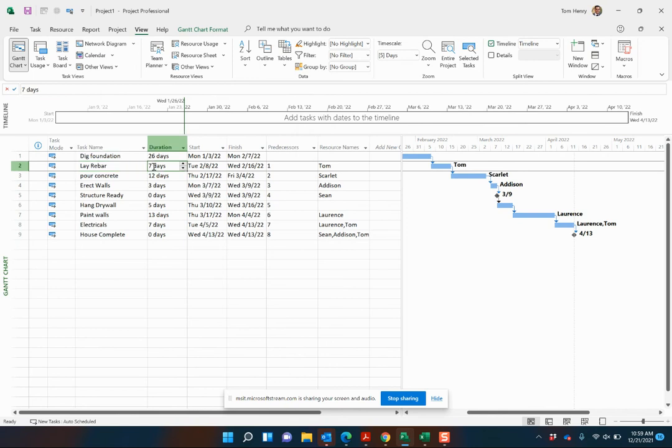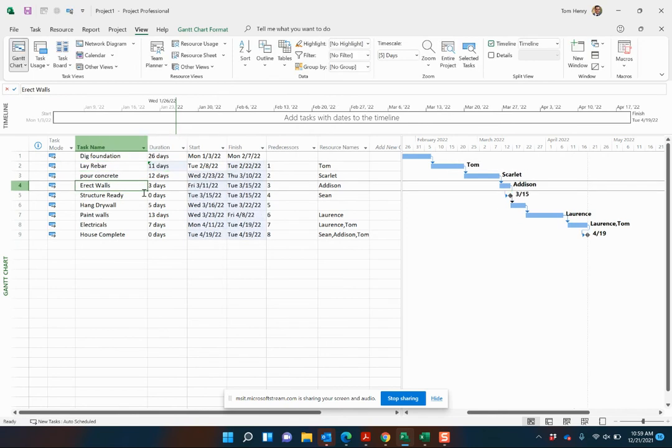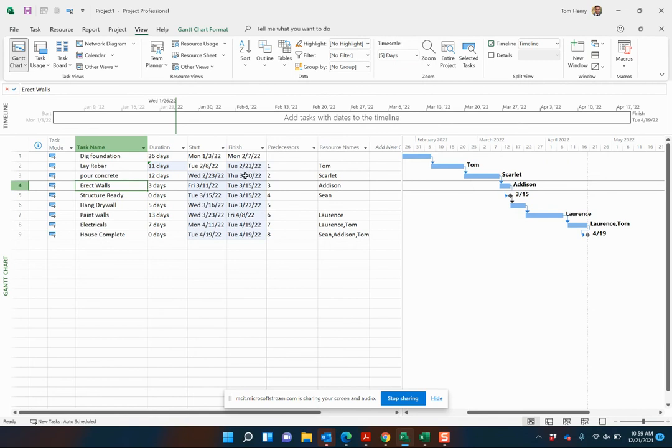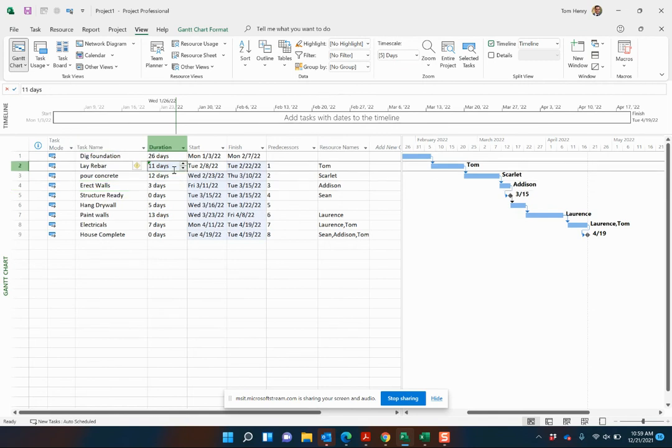If I come in here and increase the duration of the lay rebar, my project is dynamically updated. You can see the blue change highlighting here, which represents that these dates have all just been affected by the change. Pretty cool stuff.